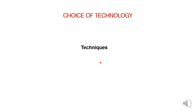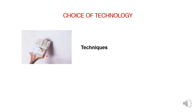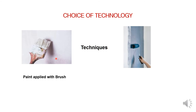The choice of technology also includes the techniques used for project work. For example, painting done by brush will require more time than painting applied with a roller. The technique using a roller accounts for less time. Modern techniques require higher cost and less time, while traditional techniques require more time and less cost.